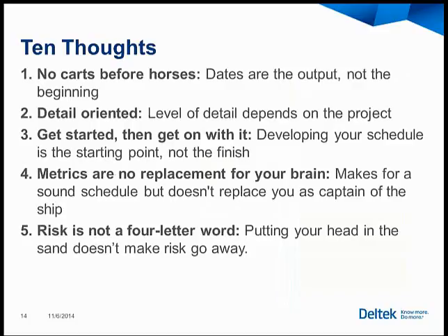Get started, then get on with it. Developing your schedule is a starting point, not the finish. It's going to be evolutionary, and it needs to be revisited early and often during program execution. Those problems that undermine project execution are often going to manifest themselves in the first 20% of project execution. Seen it time and time again, where the performance in the first 18 to 20% of the project is the performance efficiency that we will see at the end of the project. It's a little daunting in a way. You wish that at 40% you could do something magical, and sometimes you can, but you often can't.